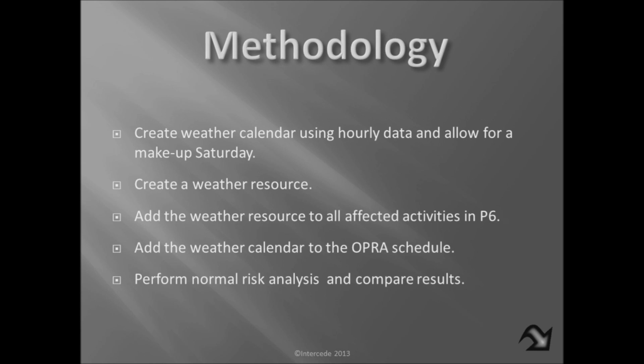And okay, the major departure that we're going to do here between what we did with rain delay and what we're calling seasonal weather is we're actually going to try to determine the P10s and P90s. Now, for rain delay, what we did is just arbitrarily select a plus or minus 2 days.